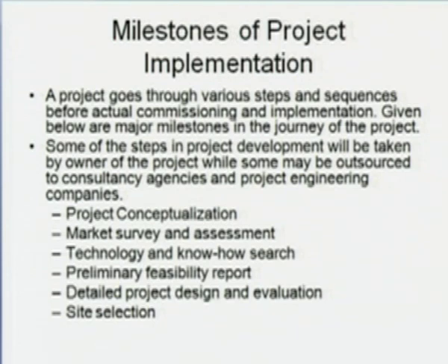Then the second is the market potential. We have to consistently look for market potential, and it has to be established for the proposed product by way of a quick desk study. This has to be supplemented later with a more reliable field study when large expenses are to be incurred on the project. Then the technology search.